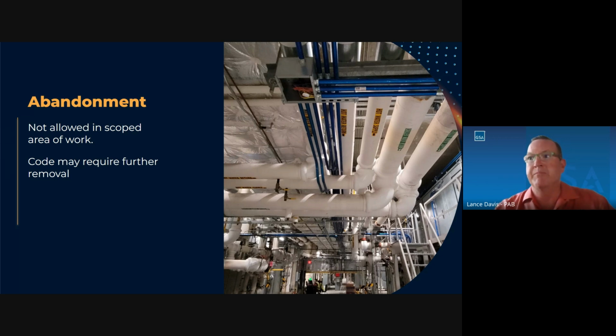And you also need to make sure that your design team is also doing a code review, because in some cases, certain equipment and things, I think like fire alarm systems and stuff like that, need to come out all the way to their source. And that's very clear in the code books as to when that's required to happen. So wanted to make sure everyone was up on that piece of it.